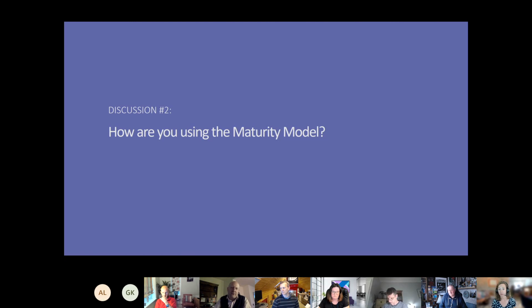They say, how do you eat an elephant? You eat an elephant with a knife and fork in small little bite sizes. So you break down a project into phase 1, 2, and 3. You agree a phase 1 to introduce essentially the basics that will cover what they're doing already. That again is a bit of a pilot, gets the business to buy in, builds the trust, etc.